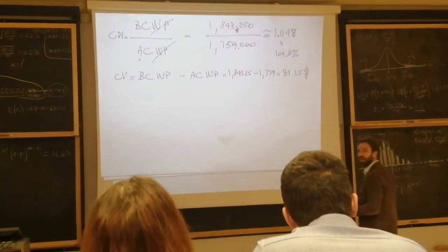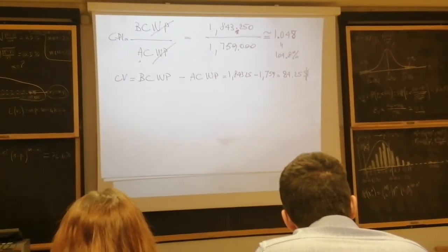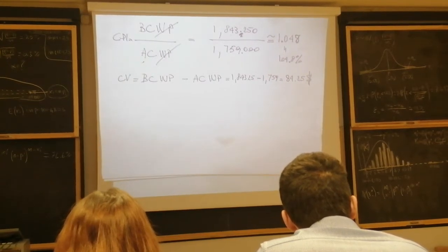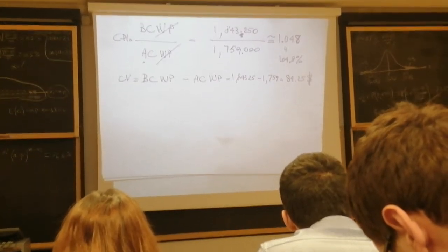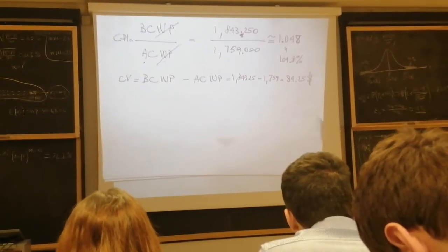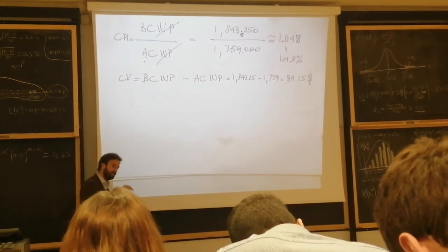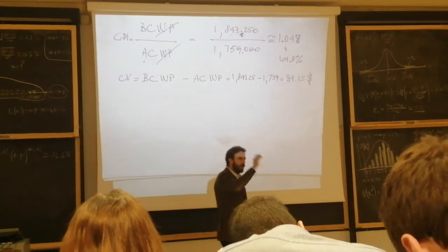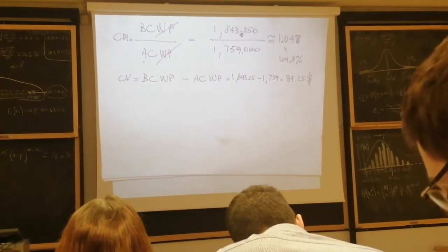And when it comes to time, the first question was, are we spending more or less? The answer was, we're spending less. And how much less? We're saving $84,250, worth 4.8% of the budgeted cost.